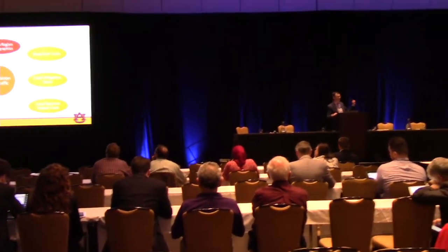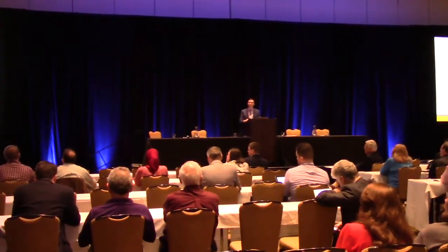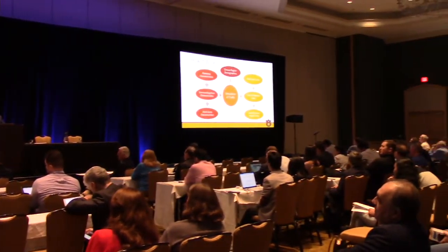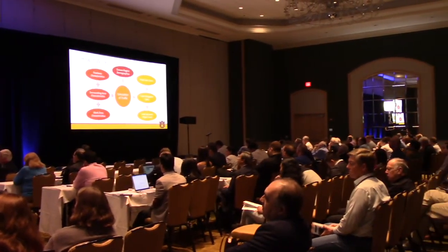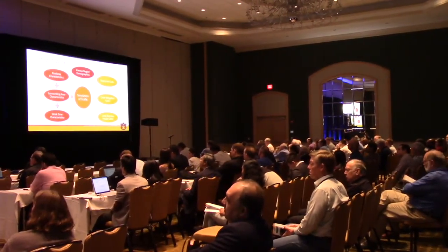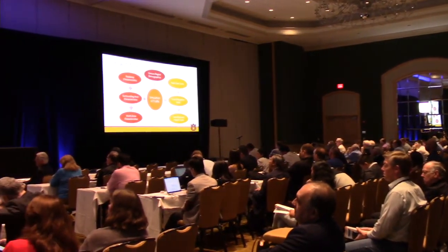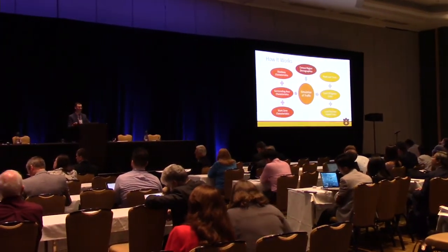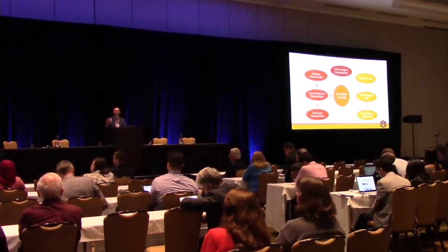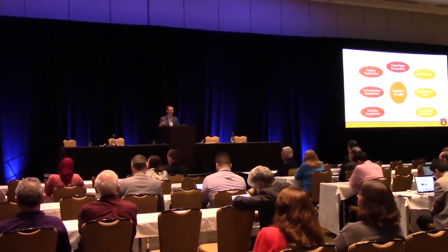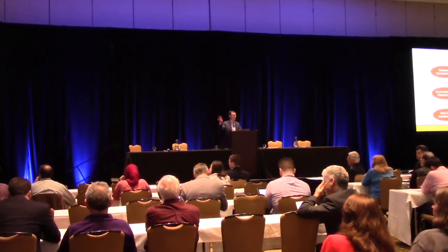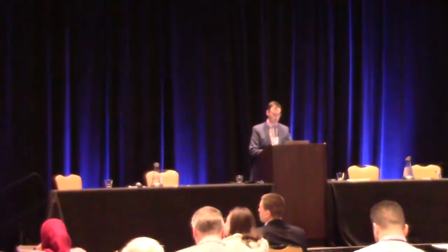We pull in information at the census region demographics for that simulation that runs in the background. If you have updated information for your local area, you're welcome to plug it in. There's a way to do that. But if you don't, we already downloaded everything for all the regions within the country. So you can use the basic information that's there, and it runs through and predicts all the different type of people that would likely go through your area based off of ages, incomes, population, or household characteristics, things like that. And then once they all go through there, it calculates those road user costs for every vehicle, the crash mitigation costs, and lastly, those local impact to your businesses.